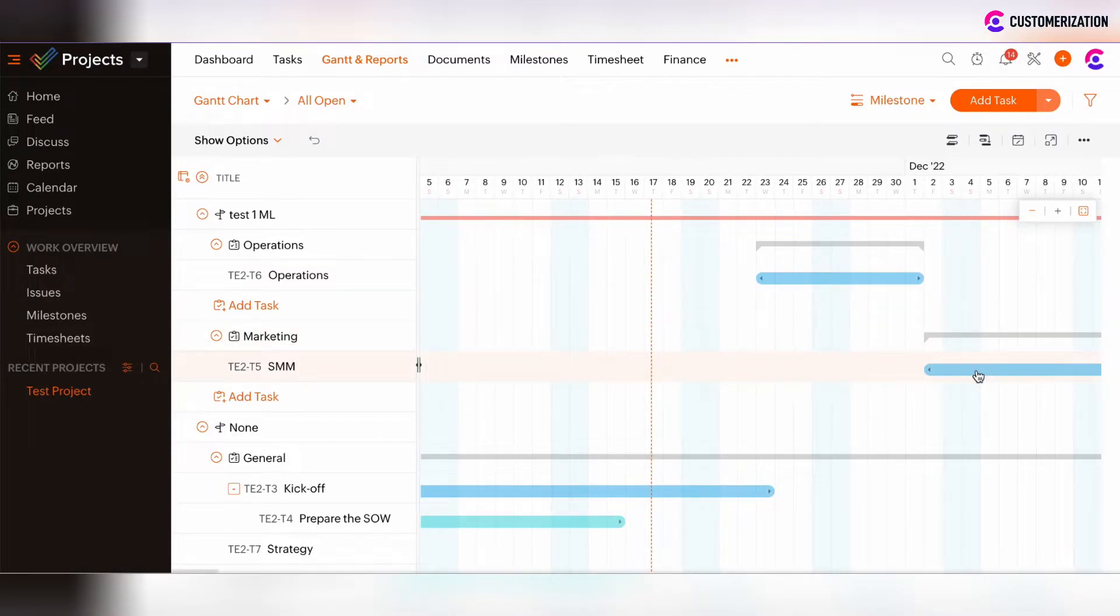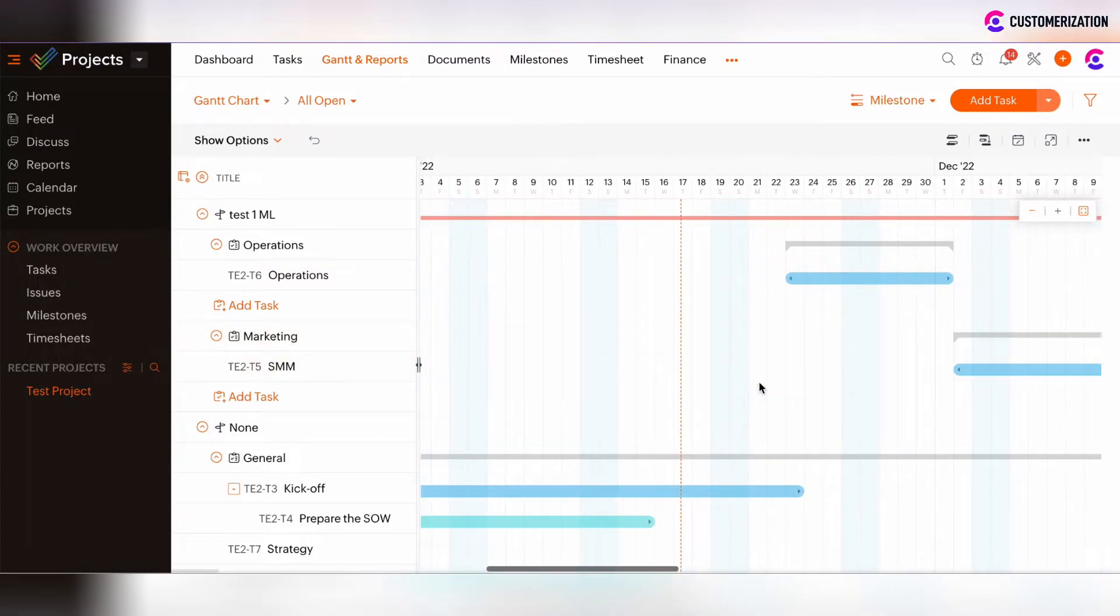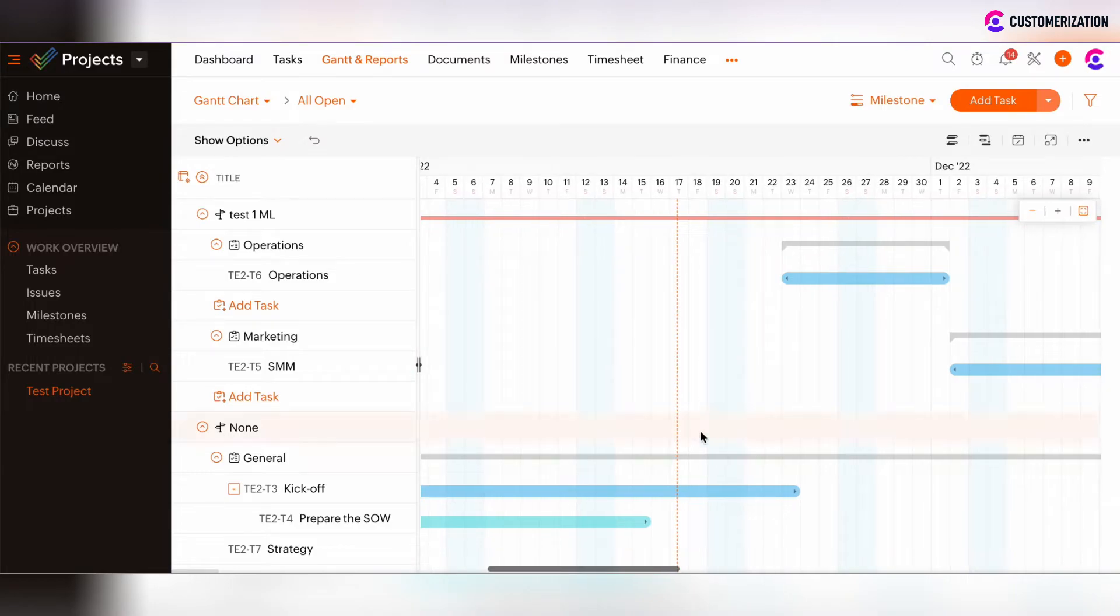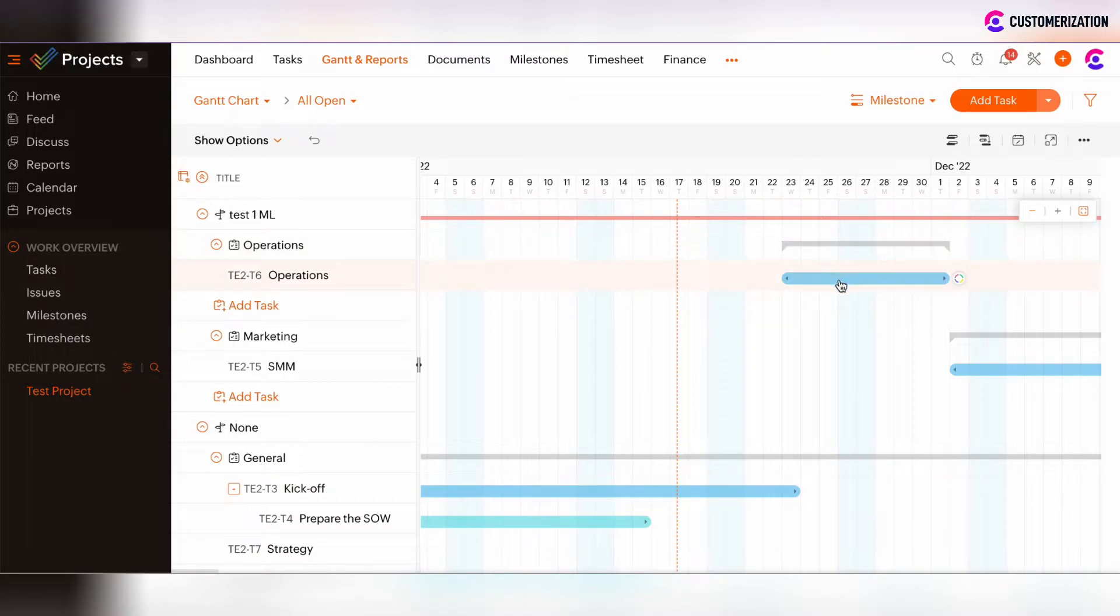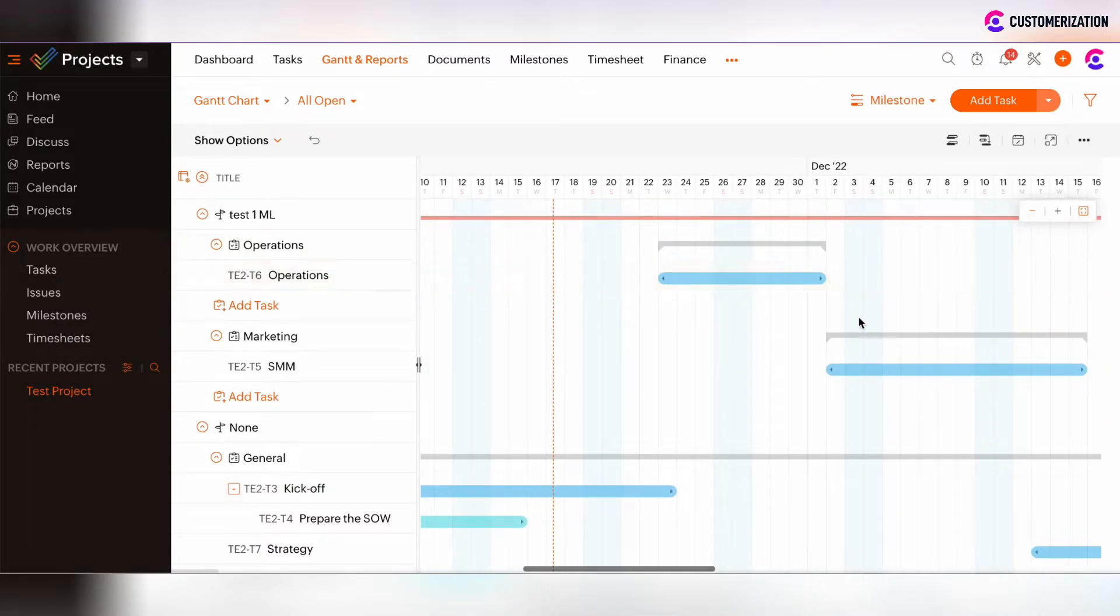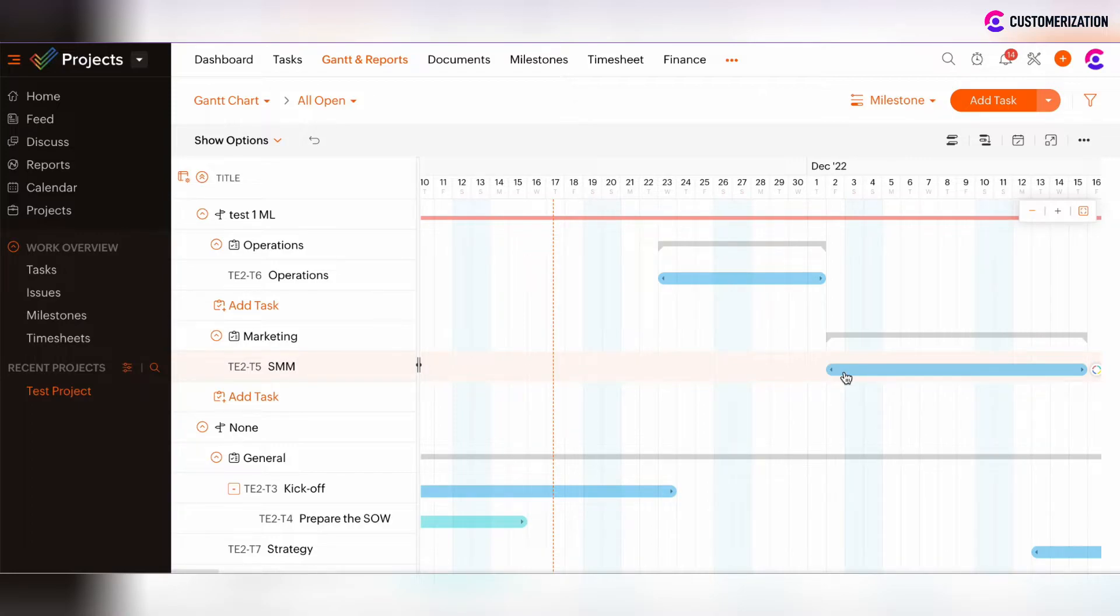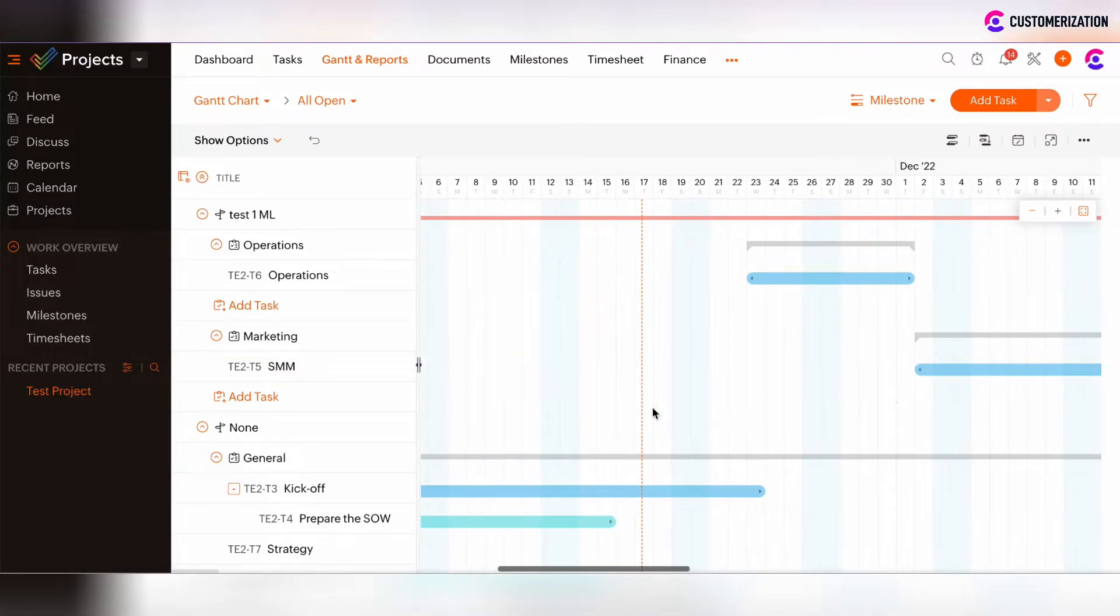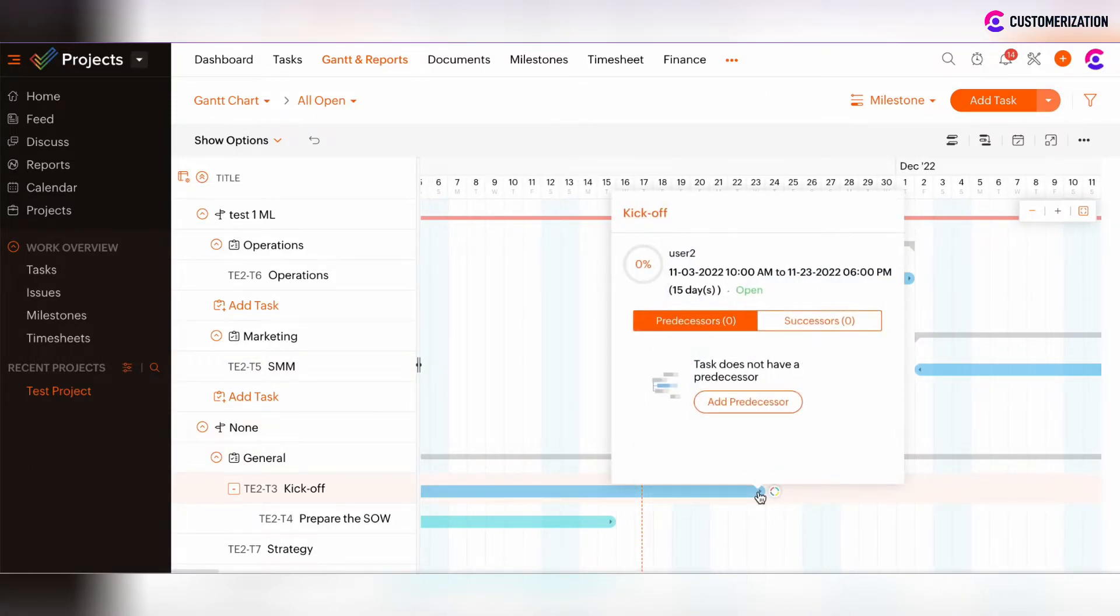So we would like to set the order of such tasks so that kickoff should be done first. Only after kickoff is completed, we can start with operations tasks. And after that, we can move to SMM tasks. To define such dependency logic, click on the arrow and we will set the successor task for the kickoff task.